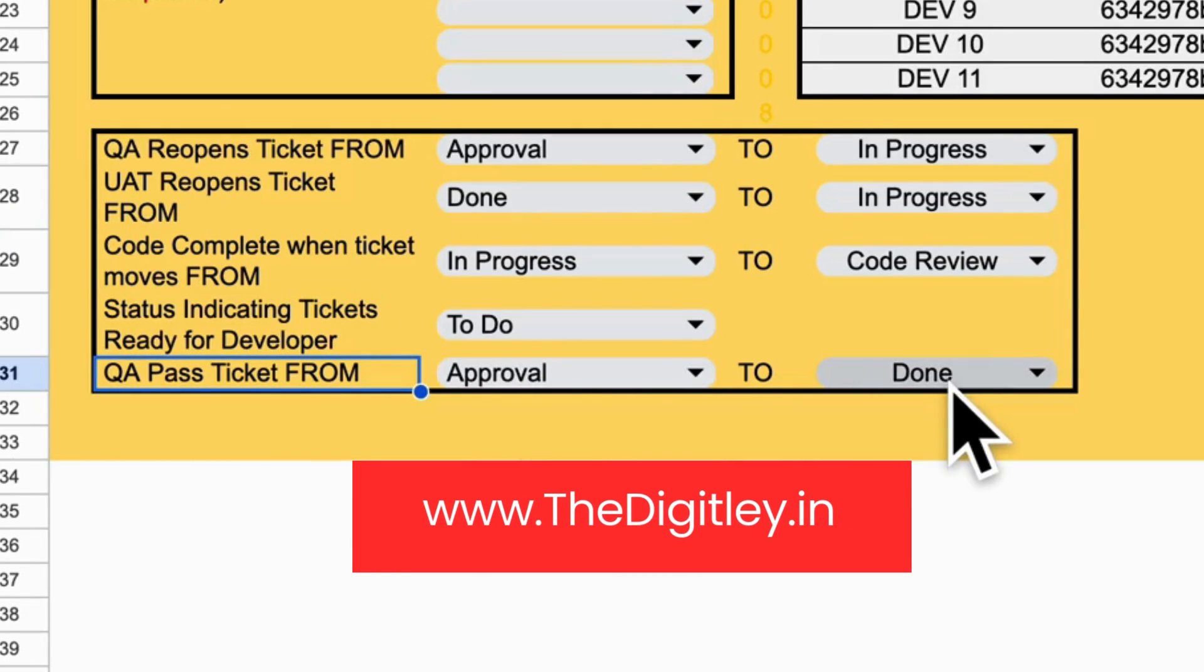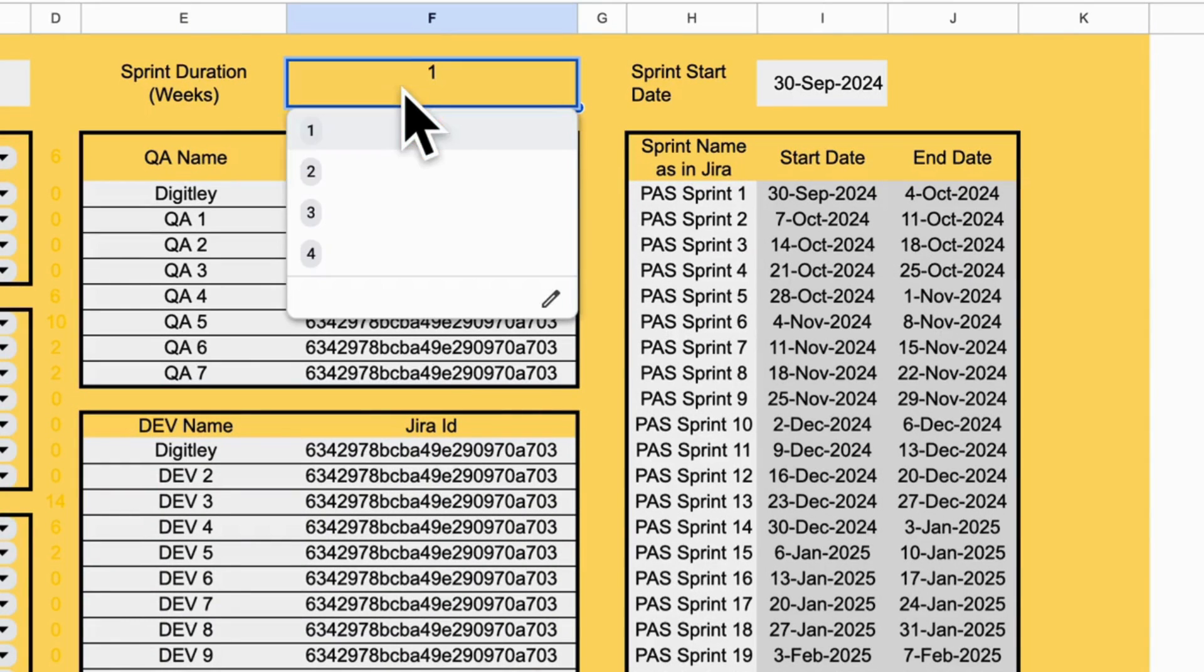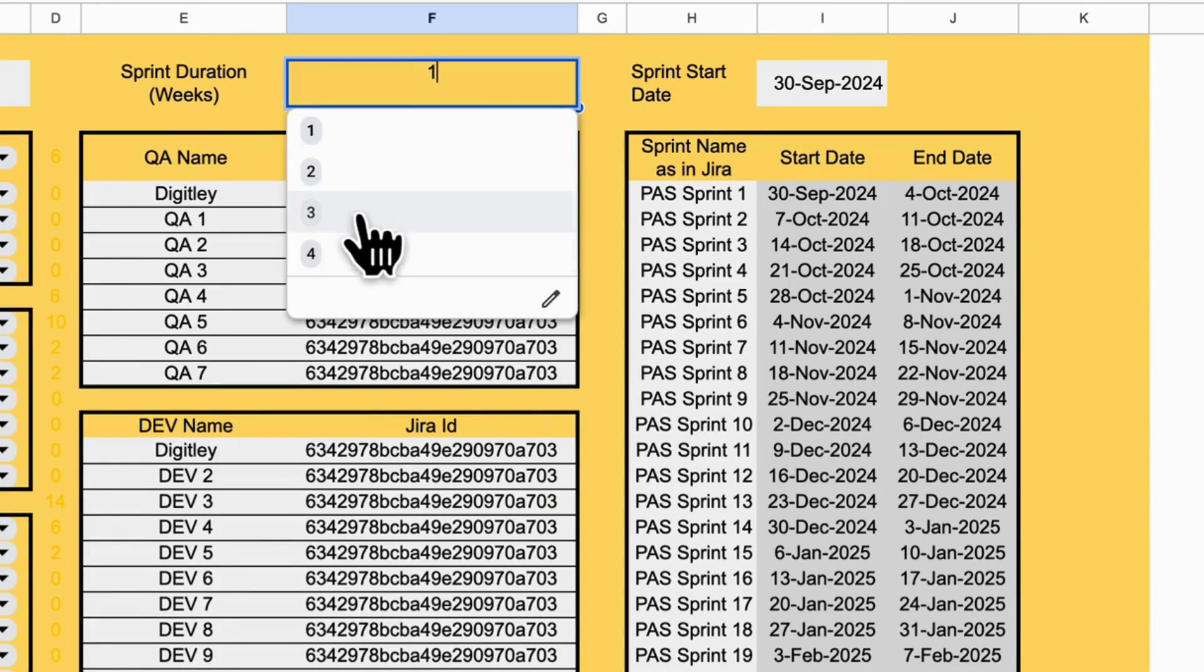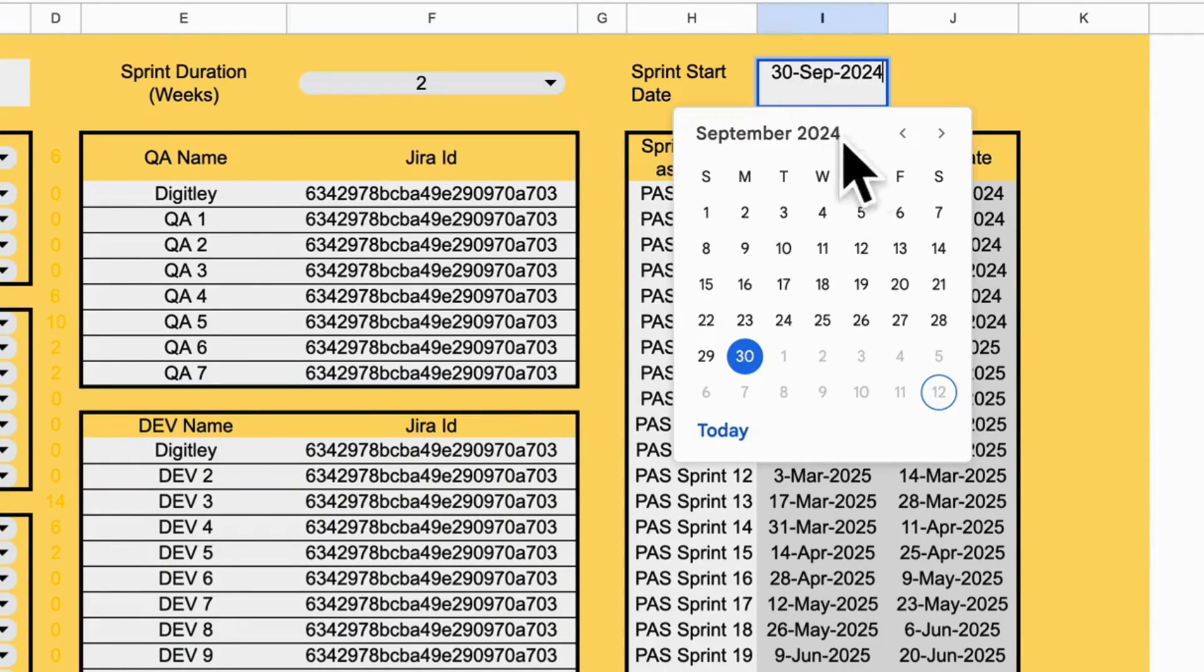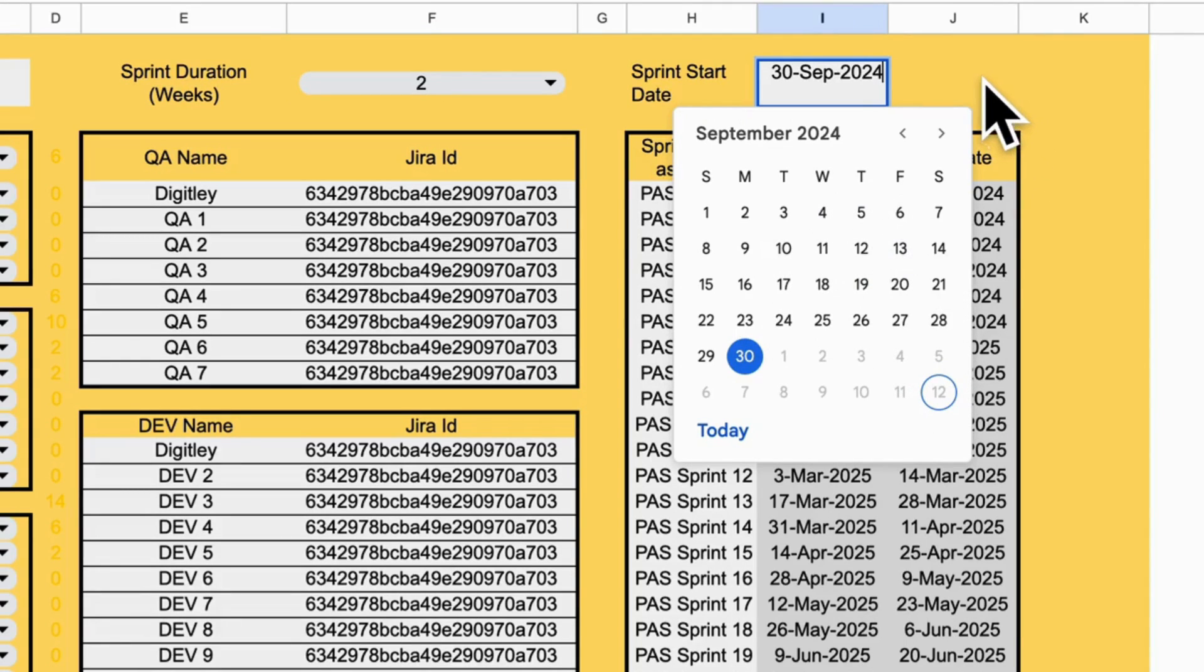Now, let's configure your sprint details. Choose your sprint duration and enter the start date. The sheet will automatically calculate future sprint dates for you.